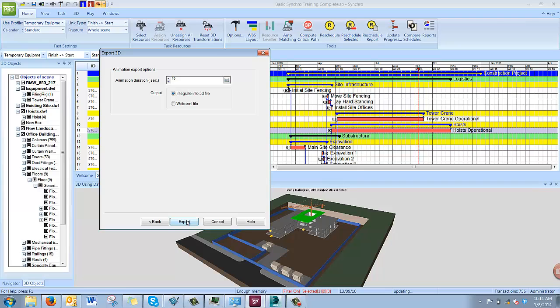On the next screen, you have the animation options. Because you're not exporting a saved animation in Synchro, you're simply exporting the entire construction sequence. You can choose the duration. If you choose 10 seconds, the entire project will happen in 10 seconds, or we'll set it to 30 seconds, and that will export the entire project spread out to be viewed in 30 seconds.